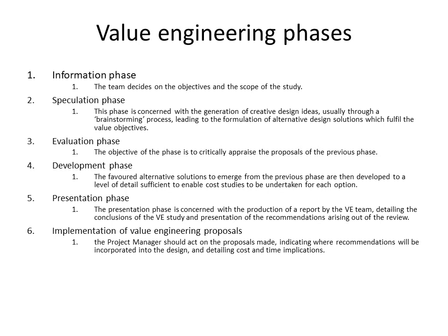The PM should act on the proposals, indicating where the recommendations may be incorporated into the design, detailing cost and time implications. So really it's looking at how we can improve the design to improve the quality, reduce the cost, or reduce the time to build it. So value engineering is very important in construction contracts particularly, but in all contracts.